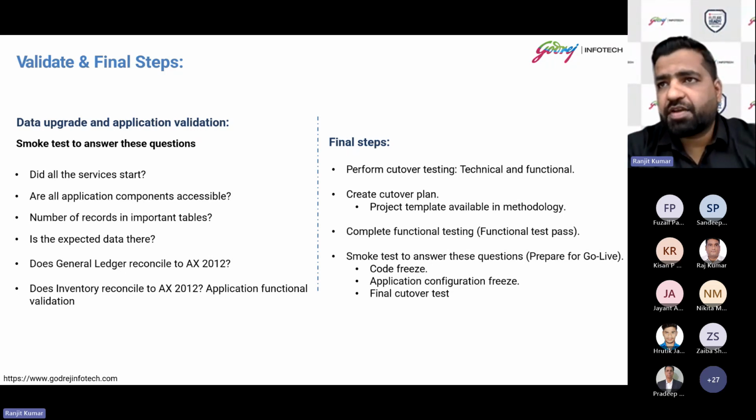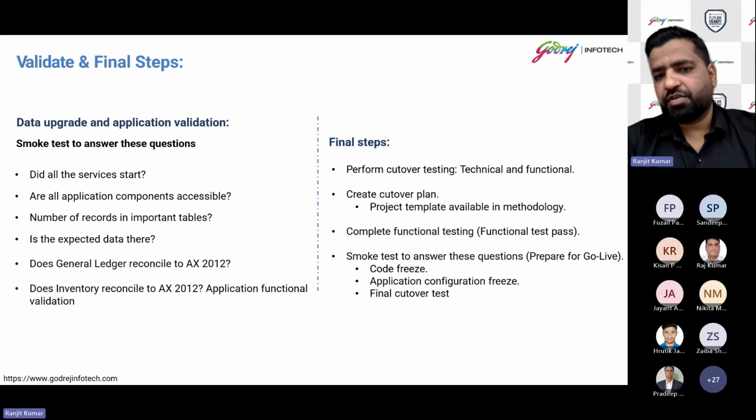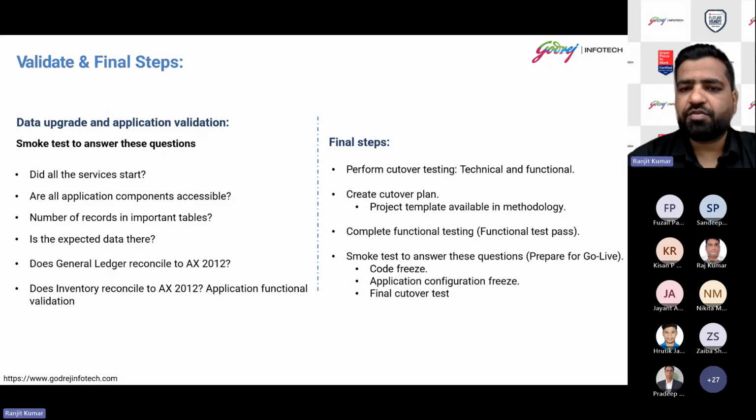Technical aspect means we need to think about the cutover timing, which is required for your code upgrade, code migration from sandbox to production, and then data migration, from the AX2012 database to D365. So based on that plan, we need to do some smoke cutover testing, where we do mocking, and we just run, and based on your tier 2 environment, we plan and finalize the cutover timing.